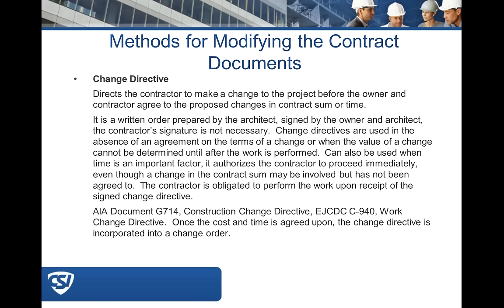How soon should the architect react? As soon as possible — you do not want to be the cause of a delay and risk delay claims. In the asbestos example, the contractor might think something is asbestos and inform the architect. The architect's duty is to go out, put eyes on it, and if uncertain, immediately notify the owner to hire experts. You certainly don't want to sit on anything.